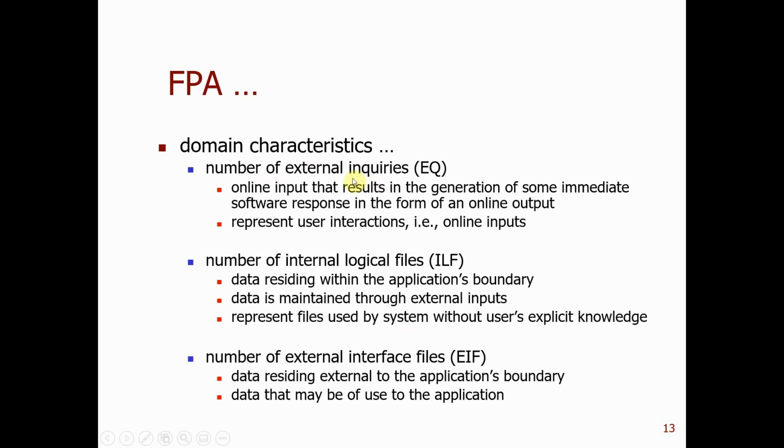And the number of external inquiries: an online input results in the generation of some immediate software response. Like you need to fill out the form, or click on some menu items. That's all considered as external inquiry.